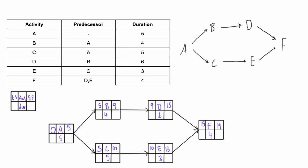Because F is the final activity in this whole project, we can say that this project has a duration of 19 days. When we put in the early start and early finish of all these activities, that's what we call the forward pass. In the next video, we'll do the backwards pass where we'll fill in these two boxes for the late start and late finish.